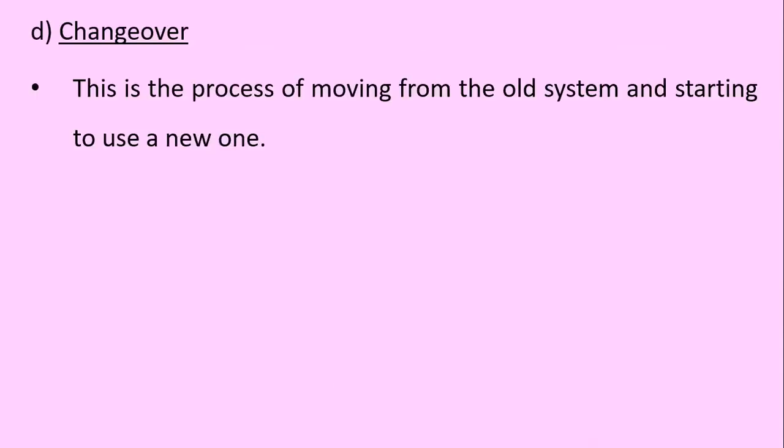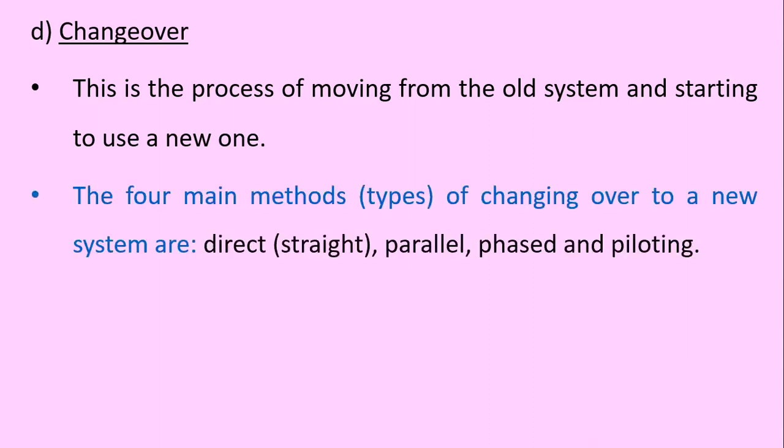Let's now look at changeover. Changeover is the process of moving from the old system and starting to use the new one. The 4 main methods or types of changing over that can be used include direct or straight changeover, the parallel changeover, phased changeover, and piloting.